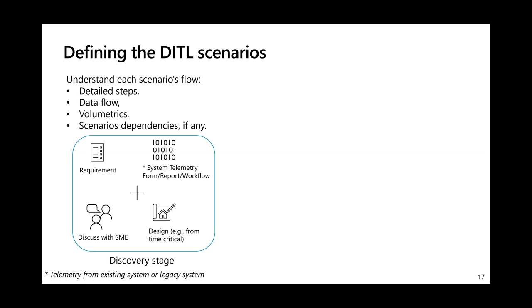Maybe you can find the top usage form, top usage report, and also the workflow when you get the measure in the system. You can understand the user or application behavior perspective in the daily operation. It's very useful for you to identify which scenario should be the key.